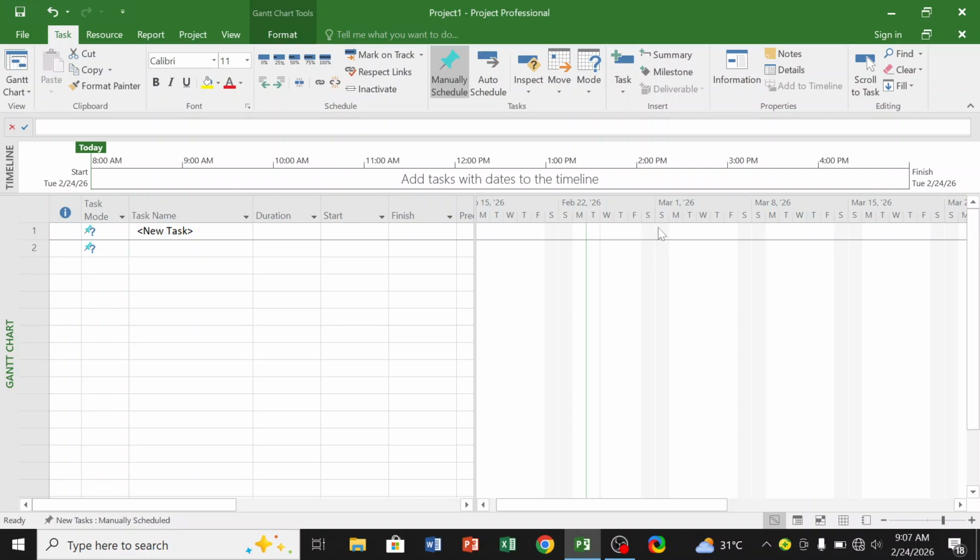as non-working days, which therefore means that if we are supposed to execute any project, Saturdays and Sundays will be non-working days based on the current settings. Therefore, Microsoft Project will only be working for the five days: Monday, Tuesday, Wednesday, Thursday, Friday. Saturdays and Sundays will be public holidays or non-working days. So that is the essence of the visualization area.